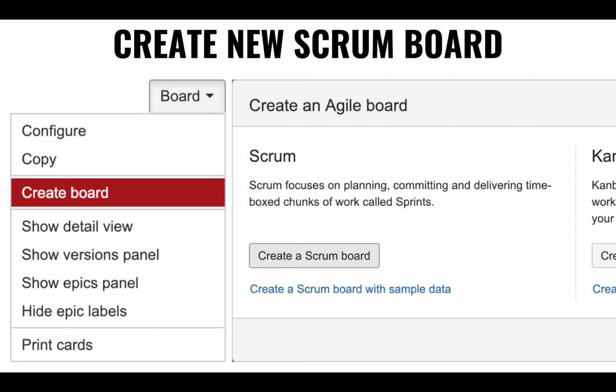A Scrum has a philosophy that we're going to time box things, right? That we're going to take 2-week sprints and work on this. These are the only things that we're going to be working on. We're not going to add new things during the sprint. We're not going to take out things during the sprint. We have identified what we need to do during the sprint. And at the end, we're done, and things might spill over to the next sprint.